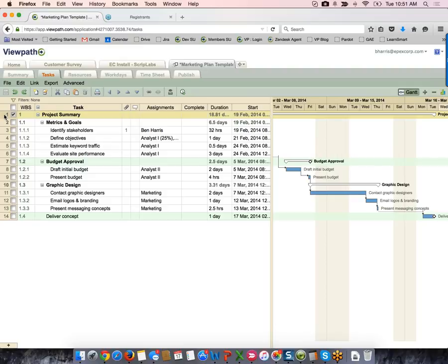If you think about templates, you want to set your templates up with as much information as you can because the templates really help streamline your project creation process. You can set up the assignees. If you don't know the specific person that will be performing the job, you can also set up a role. And then on a project-by-project basis, you can fill that particular role. So again, as much information as you can pre-build into your template so that you're just tweaking your individual projects really helps streamline that project creation process.